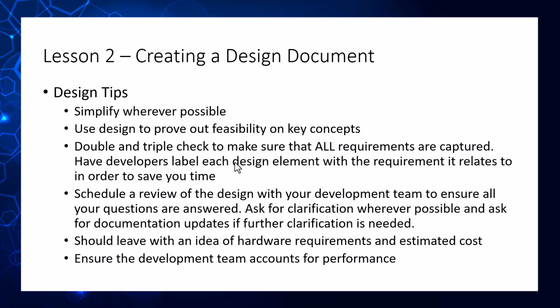And then, just make sure you leave that meeting with an idea of what hardware is going to be required and what the estimated cost is to set it up. That'll give you a sense of how many servers you need, how much it's going to cost for the servers, and whether you have the budget related to keeping the servers up. The last thing that you want is, in the middle of development, to run out of money for the project because you thought you were going to spend $50 a month on servers and you're spending $1,000 a month, and now you have to cancel the entire project because you can't pay the server bill.